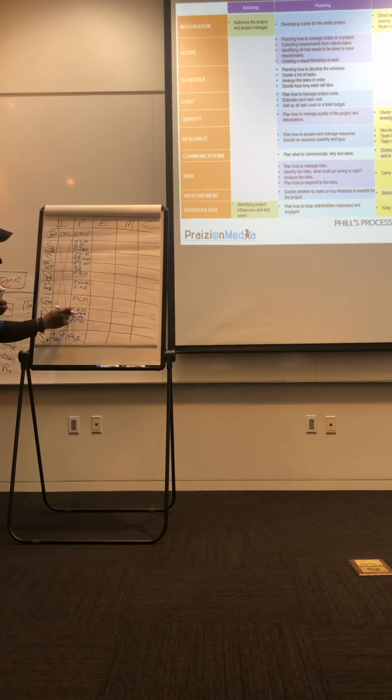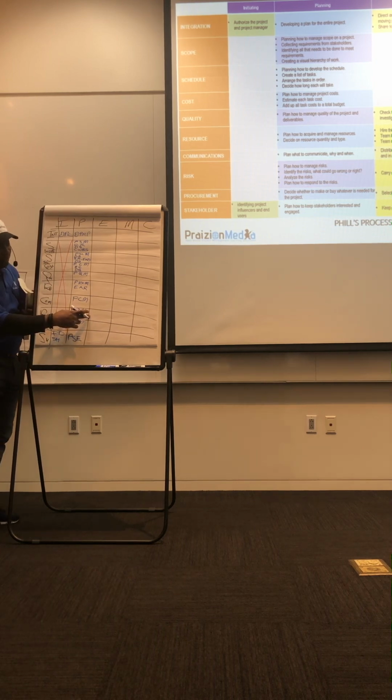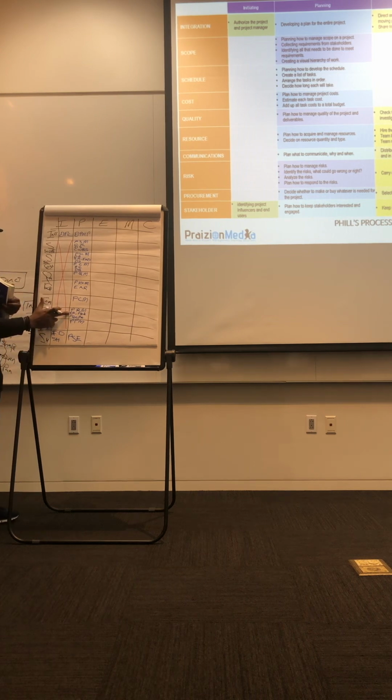That is five things that we do in risk, which is one of the biggest areas. But it makes sense because if the risk kills the project, then you're in trouble. So we want to identify the risk, do a qualitative, do a quantitative in some instances. The PMI tells you that is optional, so you don't have to always do quantitative. There are some small projects where you don't have to, and then we plan the risk responses.